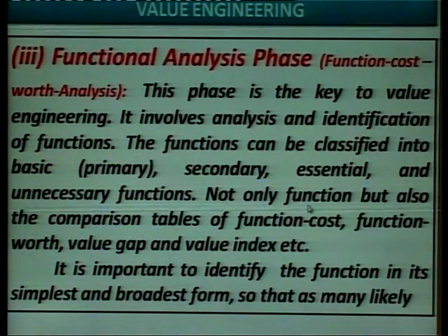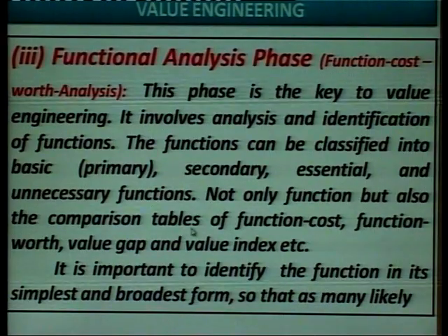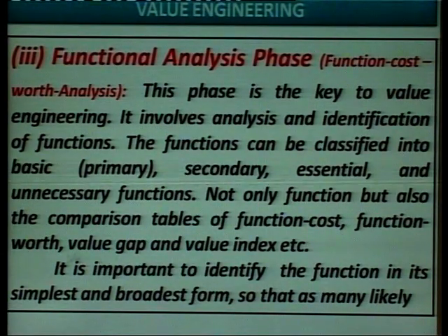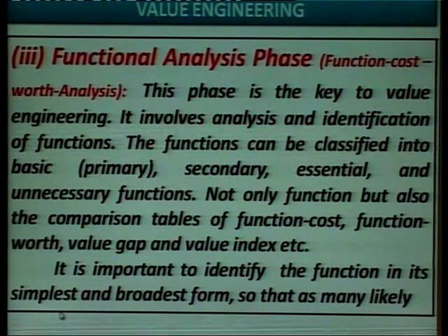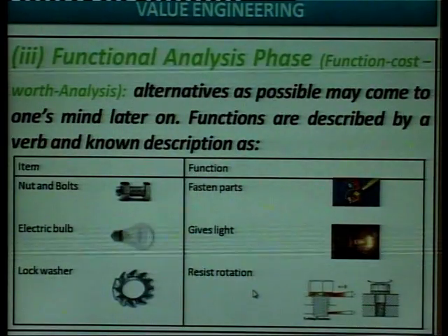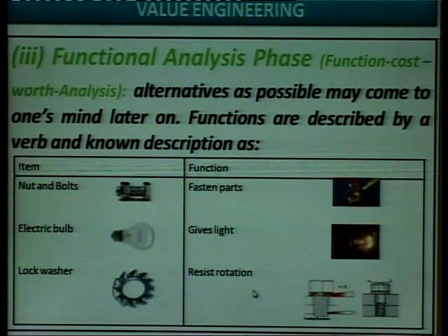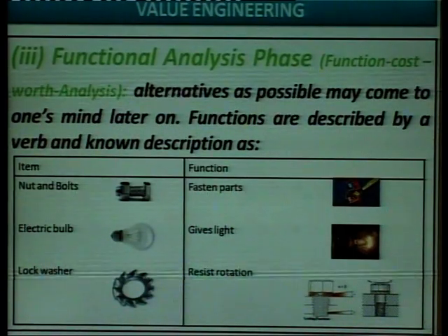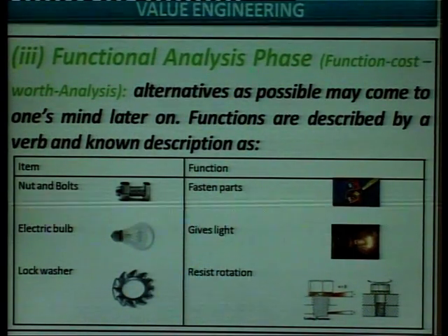Not only function, but also a comparison table of the function cost, function worth, value gap, and value index, etc. It is important to identify the function in its simplest and broadest form, so that as many likely alternatives as possible may come to one's mind later on.